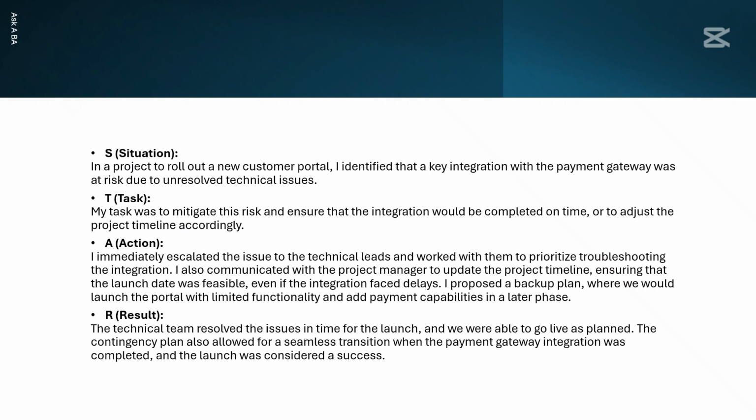I also communicated with the project manager to update the project timeline, ensuring that the launch date was feasible, even if the integration faced delays. I then proposed a backup plan where we would launch the portal with limited functionality and add payment capabilities in the later phase.